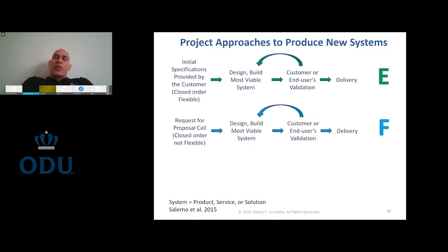Next one, the F approach, is completely closed to input from the project. It starts with a clear list of 1 to 10 requirements that we need to produce. And if we actually fall outside of those requirements, we can get sued by the customer, because that's usually put in the contract. But it's the same thing. They tell us, we need this, and they collect feedback through their minimum viable product, and little by little build the final product, and it's then delivered.